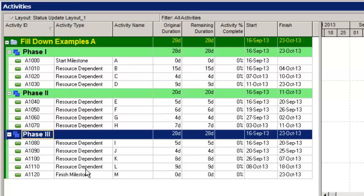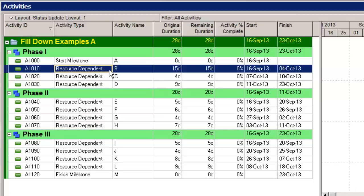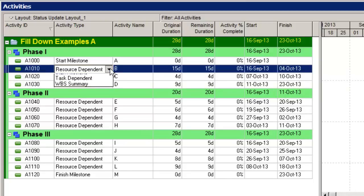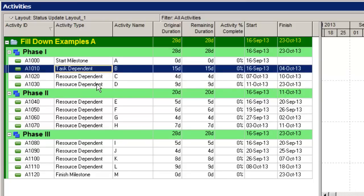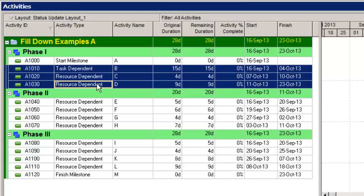So first of all, I'm going to phase one, and I want to make all the phase one activities' activity type equal to task dependent. So I set the first value up here with the drop-down, set that to task dependent. Now the next step is to hold the shift key down.